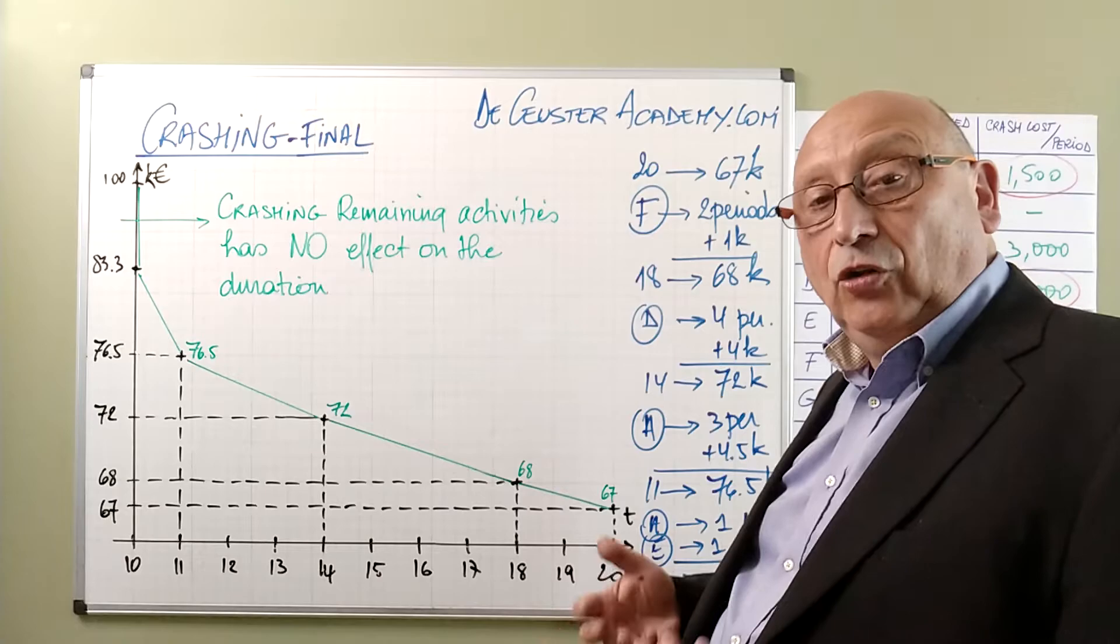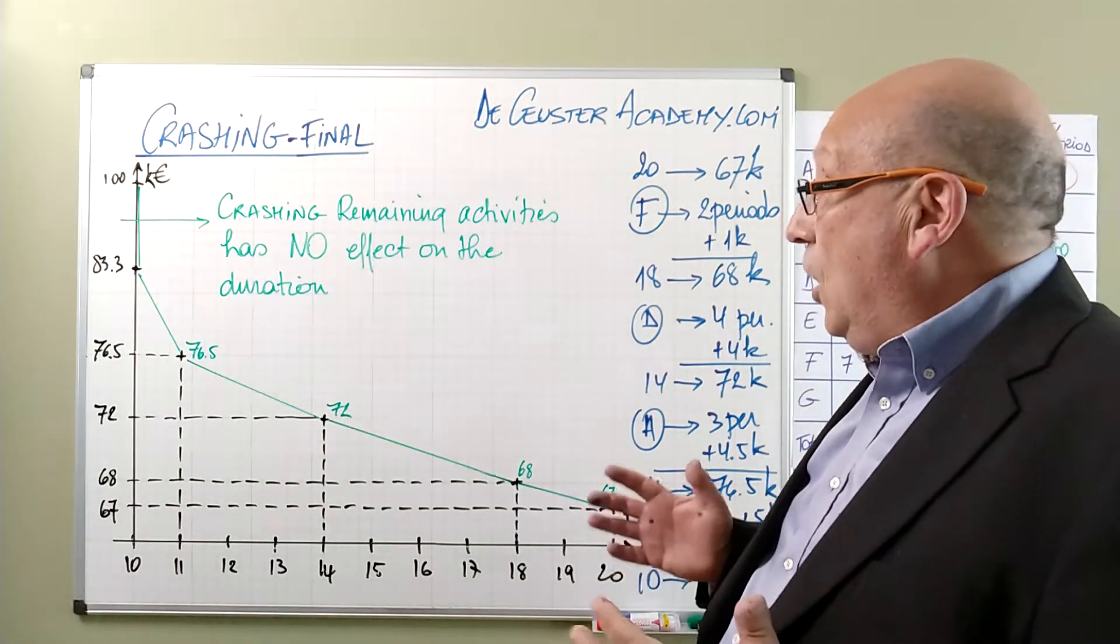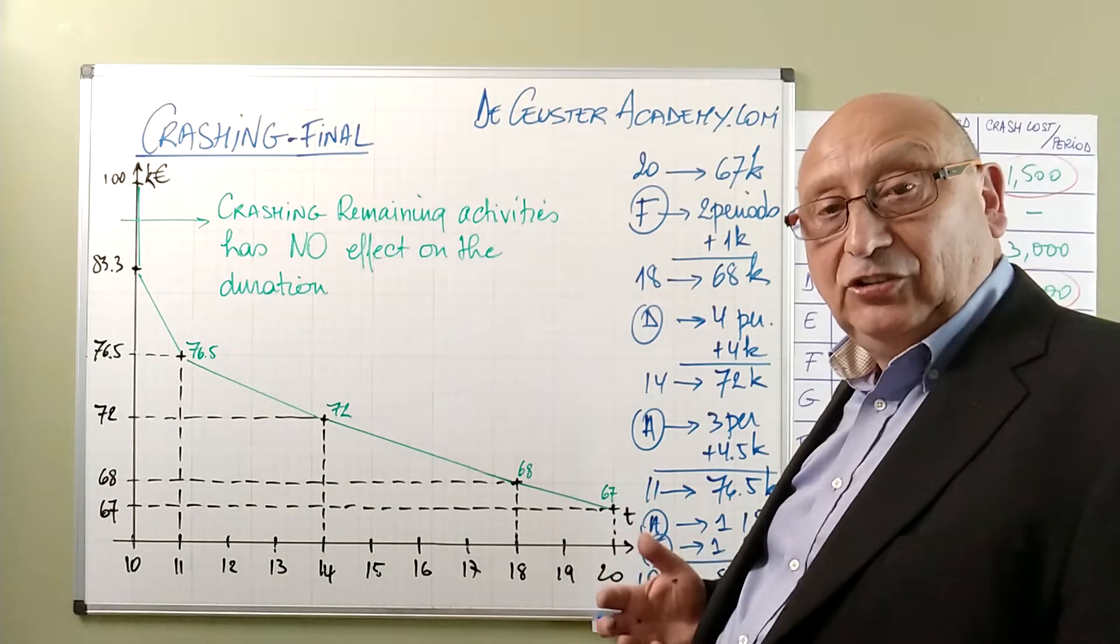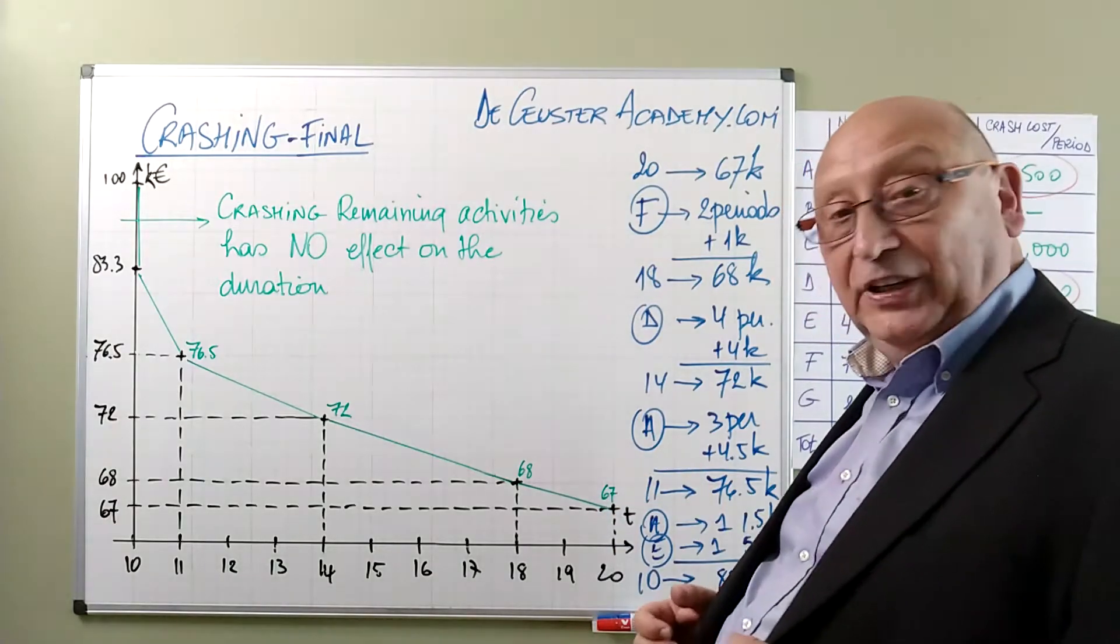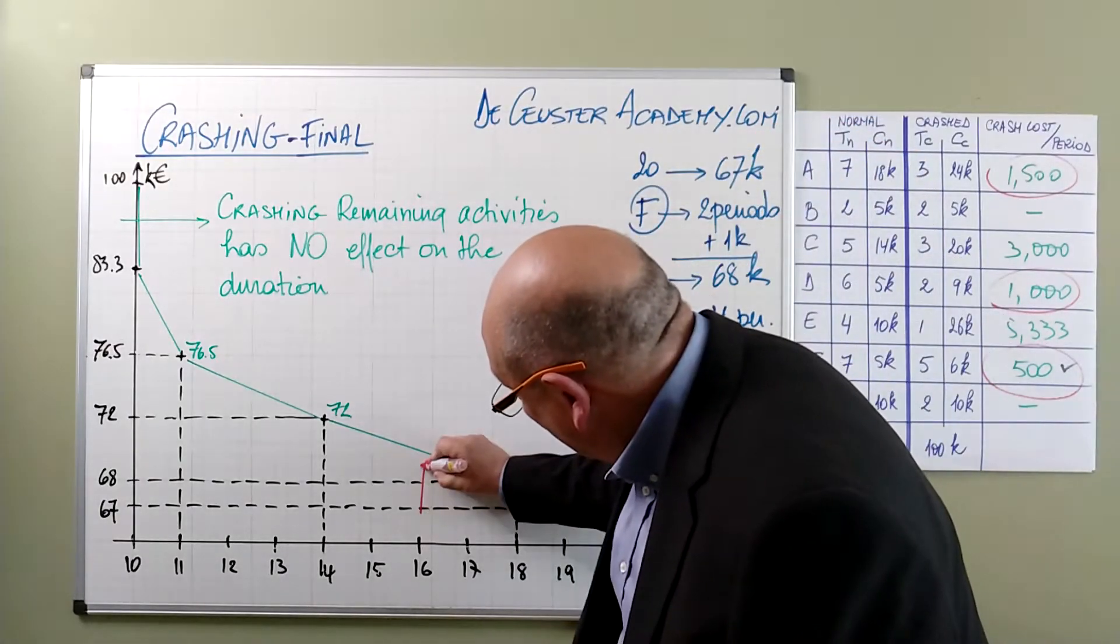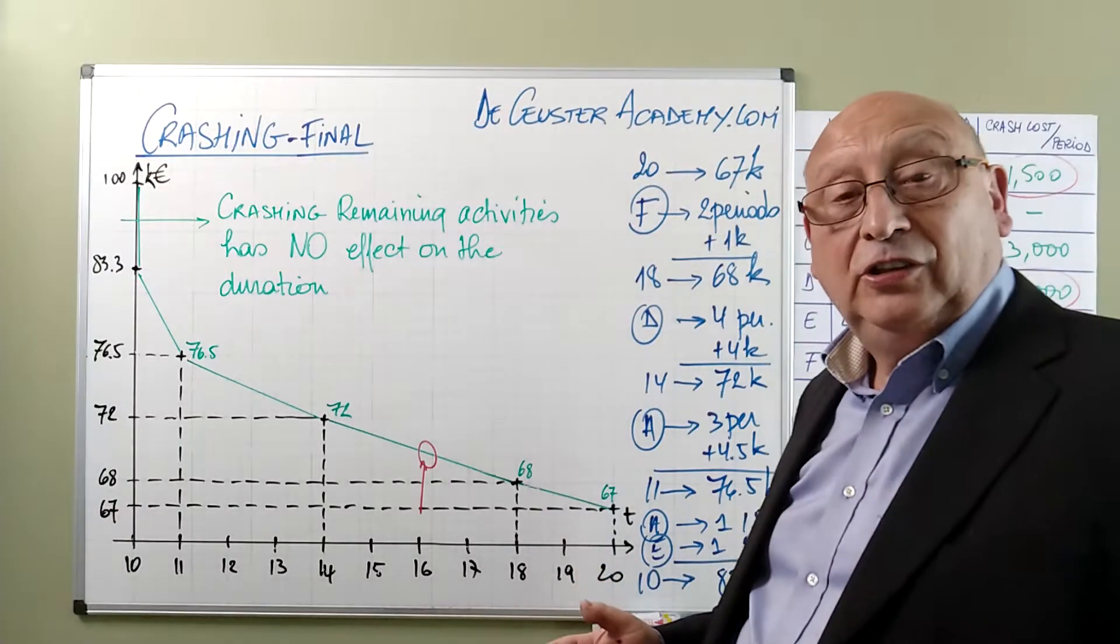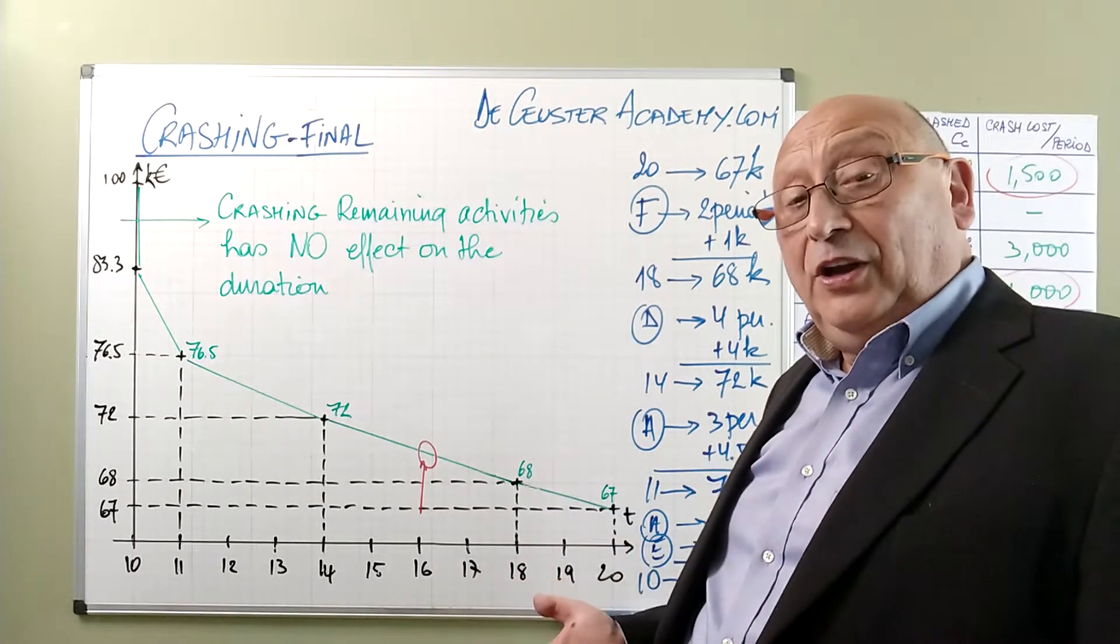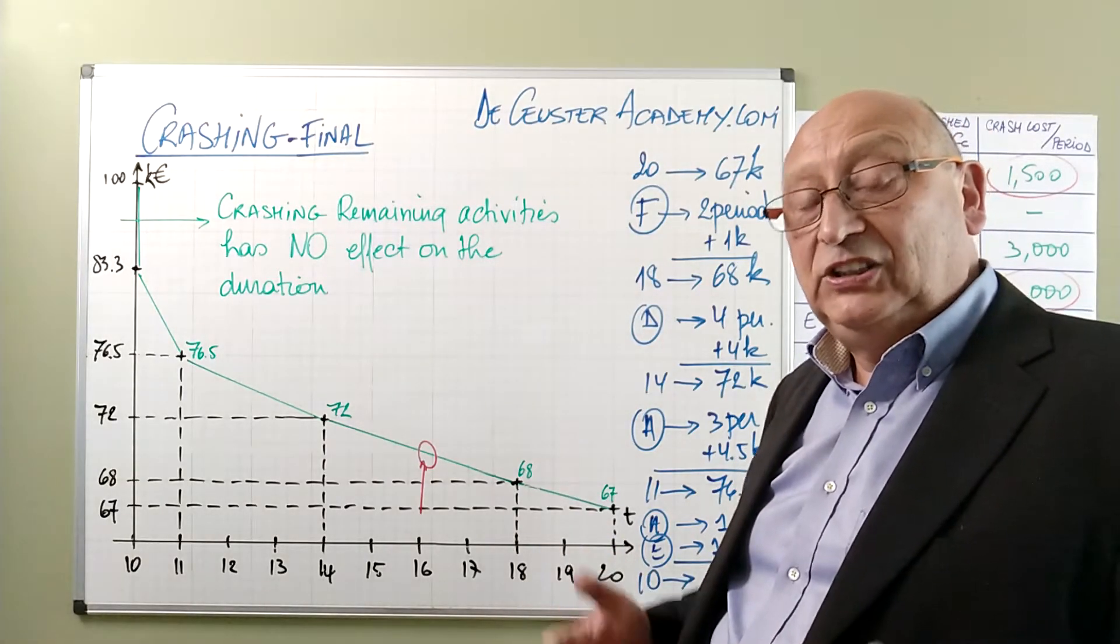Now what can we do with this? When we have a project and we have this relationship, when our customer tells us they want to have this project finished in 16 periods, we can say 16 periods, well this will be the cost of the project. We can add our fixed costs and our profit margin to give an offer to the customer. This is one of the elements for which we can use crashing.